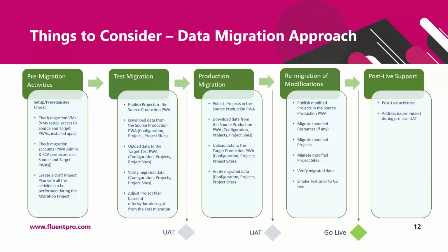We recommend notifying users about data migration being in progress and requesting them to make changes to as few projects and project sites as reasonably possible, because all modified projects and project sites will need to be remigrated during delta migration phase. So after remigration of modifications and verifying this migrated data, go live happens and users switch to the new environment.